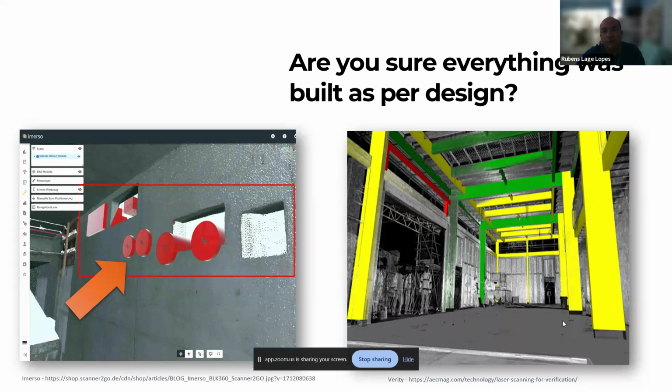So the design teams need to know. Whoever is coming later, if you're going to install equipment there, you need to know now that you have less room. And the sooner you know, the better. That's what I'm saying. We need to bring the as-built model to the equation. So in our data center, we are doing that, we are coordinating, and we are as-building. You're updating the as-built model, and so all the teams are kept in the loop. And if you're doing offsite construction, if you have offsite fabrication, then you can adjust. We are all good.